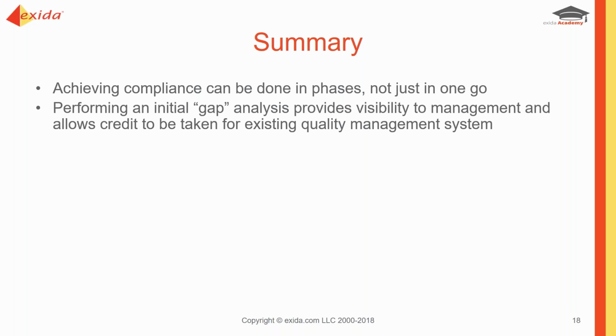The purpose of that initial gap is that we get visibility. So we can go to management with a report and findings and say, okay, it's not as bad as we thought, here are the gaps, this is what we can do. And we've done that with a number of clients where we've gone in, it's not as bad as they first thought. We've also had clients where we've gone in and it has been fairly significant, but we've managed to phase it out over an 18-month to 2-year period, which was acceptable to management. It was manageable in terms of budget and costing. And so it was easy to handle.